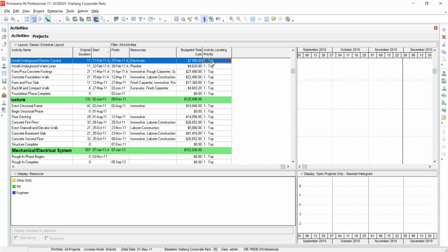Yeah, so for every activity, you can choose between this. There is another way of using codes, like writing your own numeric numbers, but this one is also okay. You can just say whether it is normal. When you say it's normal, it means there is no big priority attached to it, nor does it have a very low priority. So that is the normal one. Now there is high and top, then low and lowest. So I can choose between one of the five.